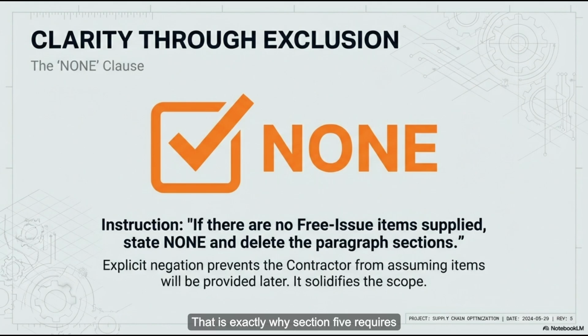That's exactly why Section 5 requires such intense detail. Supplier details, quantity, delivery date. You need to know exactly whose phone number to ring when you are ready to flush those pipes. It feels like the stakes get higher and higher the further down the document you go. Materials are early on so you have time to react, but startup items hold the entire project hostage at the very end. That is a brilliant way to put it.